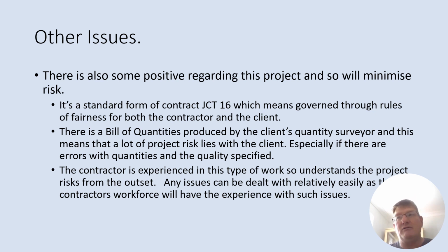Okay, the beauty of the bill of quantities, it's created by the client's quantity surveyor. So if there's any problems inside the bill of quantities, it hasn't been measured properly, or the descriptions in the bill of quantities don't match the drawings or the specifications, then that risk is borne, if you like, by the client, not you. So that's the beauty of a bill of quantities. It reduces the risk for a contractor. Okay. When I say contractor, that's you, the person carrying out the work.